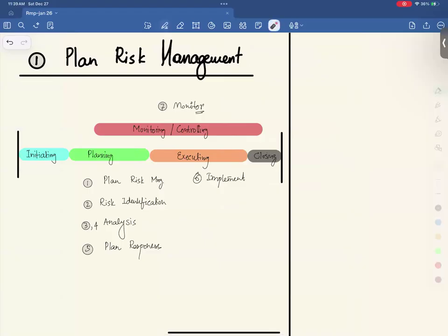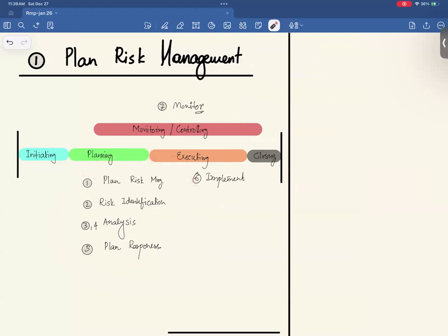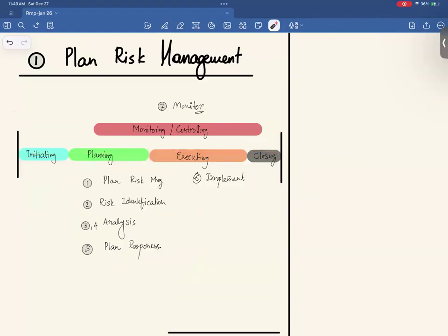According to this, it says, yes, risk identification is done during planning. Then why are you guys saying it's a continuous activity? We do this during planning. How is it continuous? Who would like to answer? Maybe we miss something during the planning. So during the monitoring and controlling, we identify another one. Yes, absolutely right. Because it's uncertain. You cannot identify all the risk during planning, right? So even if you are in the execution, you may identify a new risk. So it's a continuous